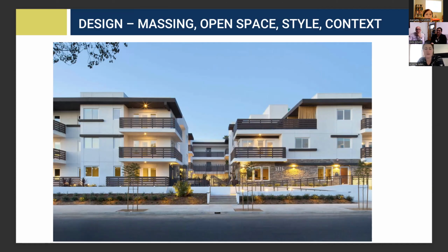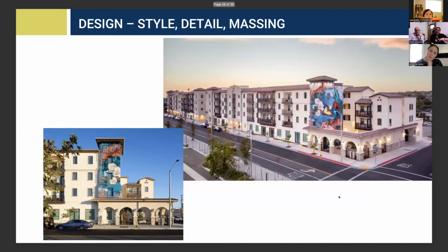One question is, how do you usually approach the parking part? What are the strategies you use to reduce the cost of parking? Gosh, parking is probably one of the most expensive things right now. One of the things obviously would be at-grade parking. So like the designs where you don't have to go underground, but if you can do at-grade parking and maybe you wrap your building around it, that's going to be a huge savings, because I think it's like $60,000 per stall to dig.